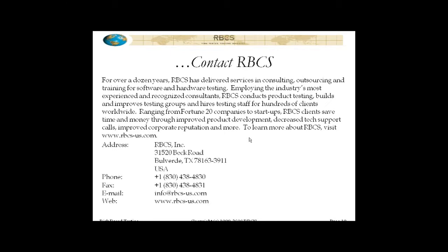And if you find that the tests are all written and they need to be run in a particular order, which is not the order of risk, usually what's happened at that point is that you've introduced unnecessary and unfortunate dependencies between test cases that really should be engineered out. Certainly it can make more sense to run some tests in a particular order, but if you find that the tests can only be run in a particular order, many times that's bad test design and engineering that should be looked at.